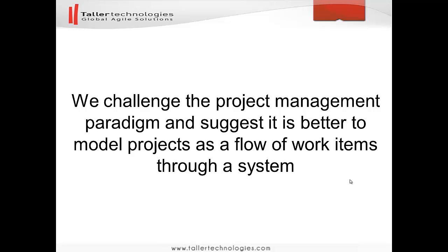We challenge the project management paradigm and suggest it is better to model projects as flow of work items through a system. A project is just a batch taken out from the flow of the work. Say the flow processes thousands of work items. We can name a batch of some 100 work items a project, but we have statistical data for the flow itself and we use that data.